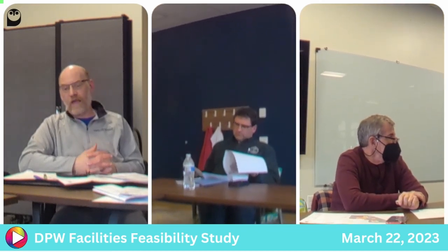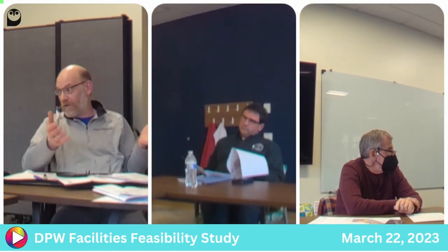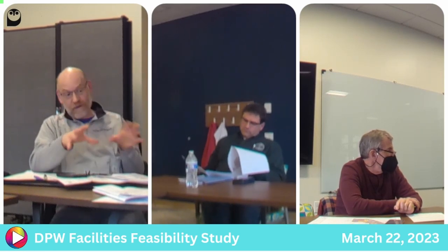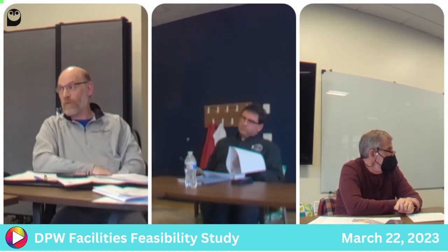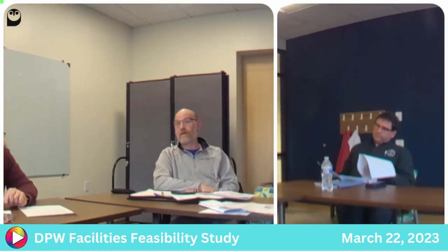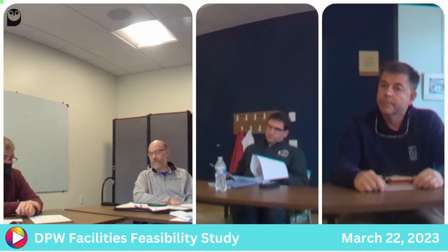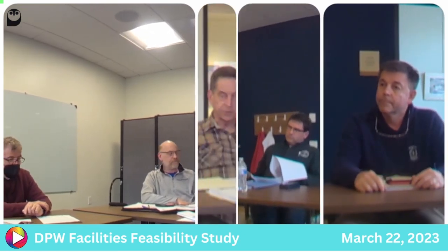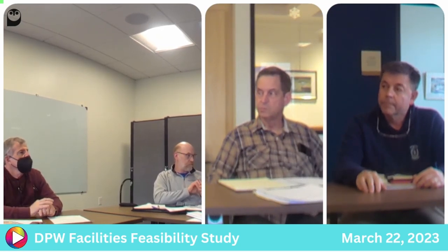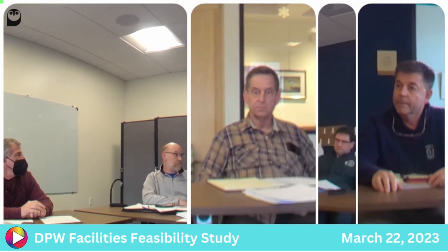At some stage similar to this, we'll do a preliminary set of geotech, which is really just one day of drilling in select spots based on whatever concept we're at the time. So that we get an impression of whether we are on the right track, or is there anything unknown there? The existing building is built on grade. There's no indication particularly of anything bad, but, you know.